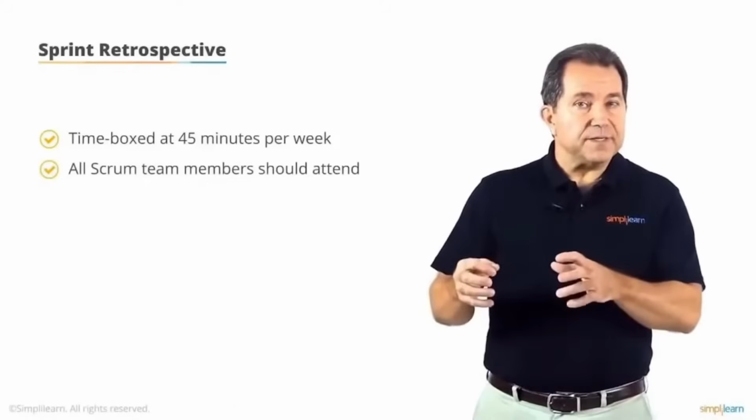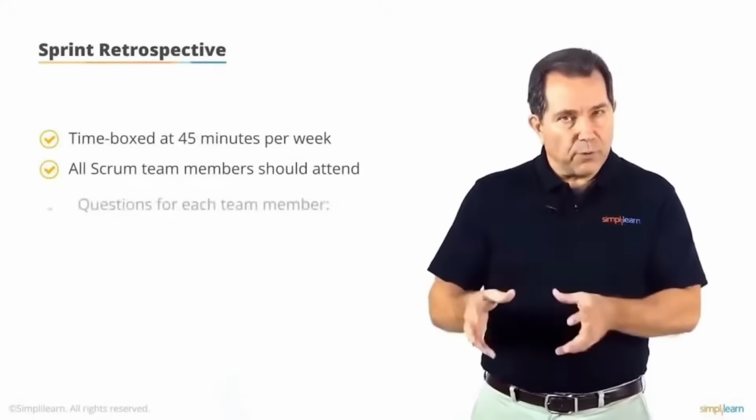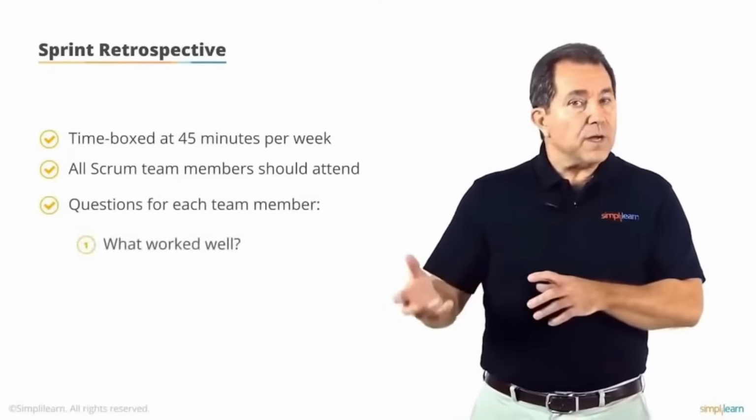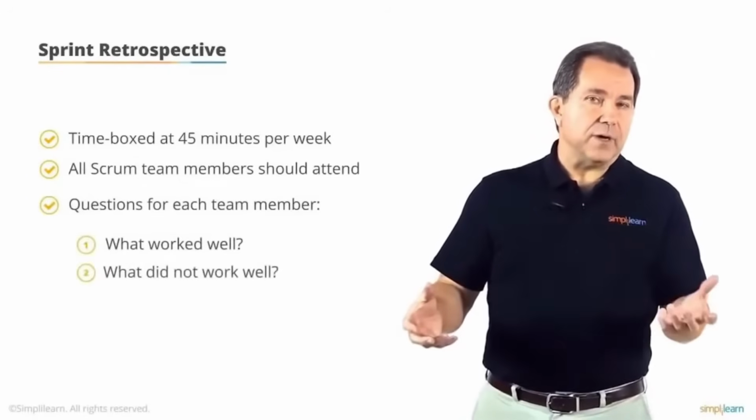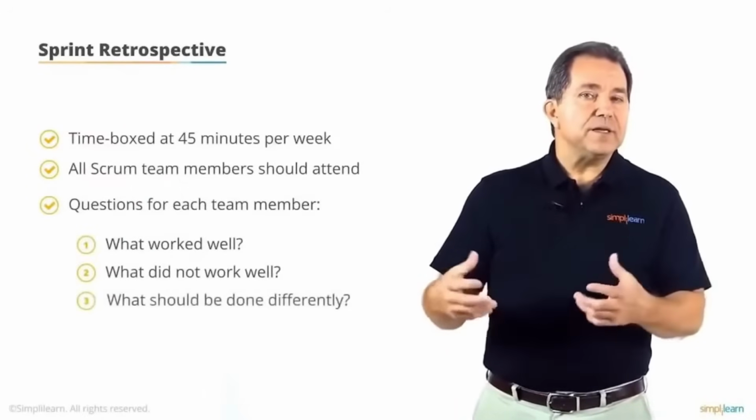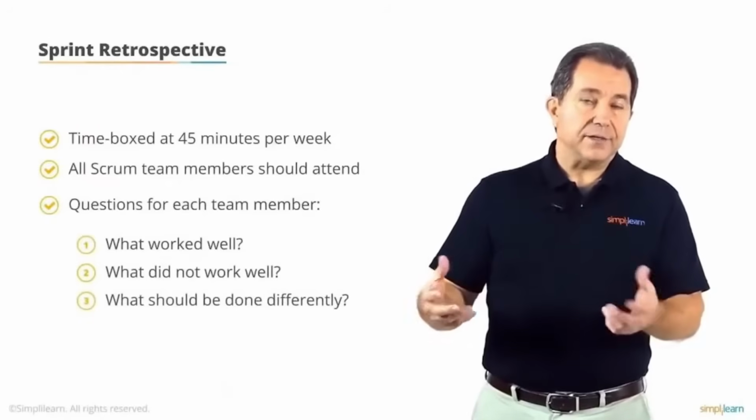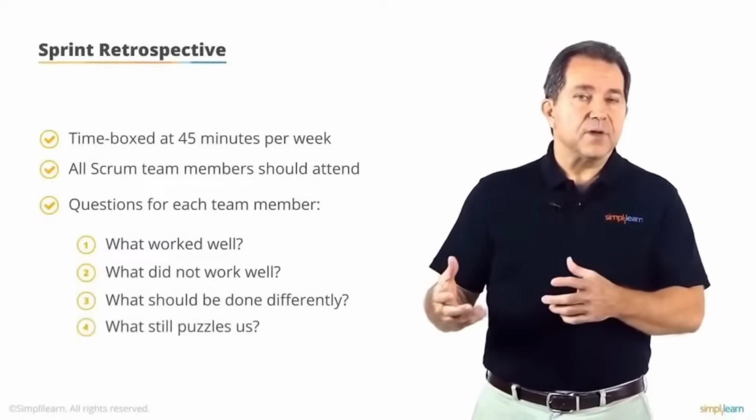During the retrospective, the team answers 4 questions. What worked well? What did not work well? What should be done differently? And what still puzzles us?